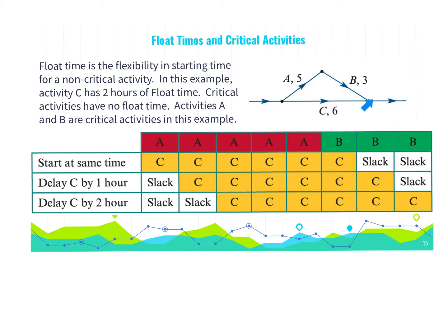So before we can start that next activity here, we have to complete A and then B. All right, so the minimum time, the earliest starting time that we could start this activity going across in this direction, probably called activity D, would be 8 hours. However, C here only takes 6. So different people look at this in different ways, but you can use a table.